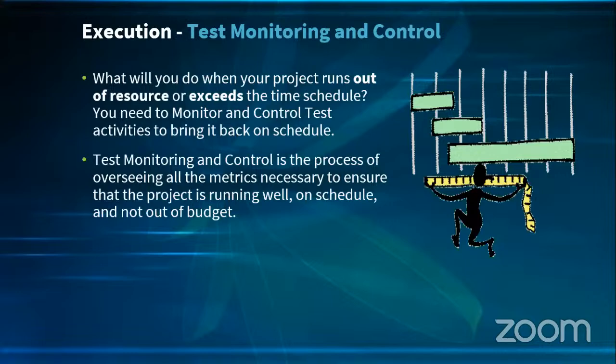So we are monitoring, looking at it. Okay, at this phase, I've got X number of days. 2 days can be added. All right, if 2 days are added, it means it shifted the ones that were in those 2 days. So we need to move it a bit. That is the way it works. The way things are going needs to be communicated to everyone. You should have a schedule to show how testing is going on.